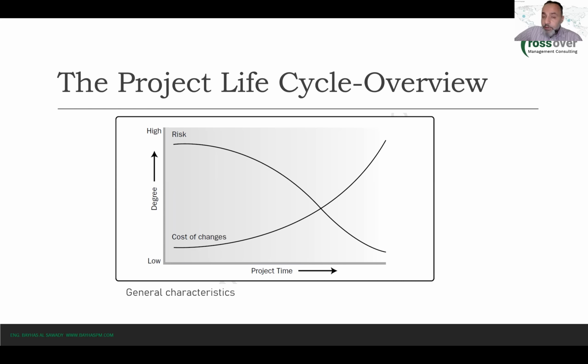You have a lot of change requests when you don't identify your project stakeholders correctly, and when you don't listen to their requirements, and when you don't gather their requirements correctly. Okay, so in order to avoid this costly problem, you need to make sure to identify your project stakeholders as soon as possible.